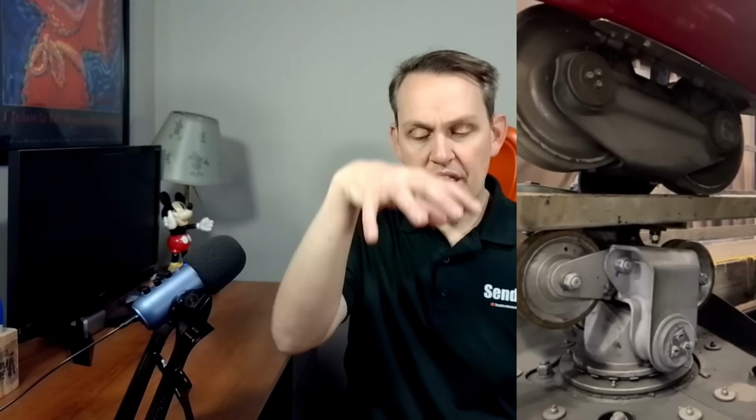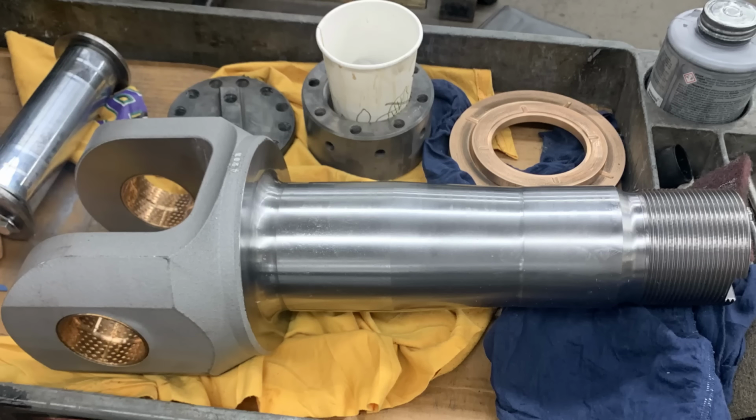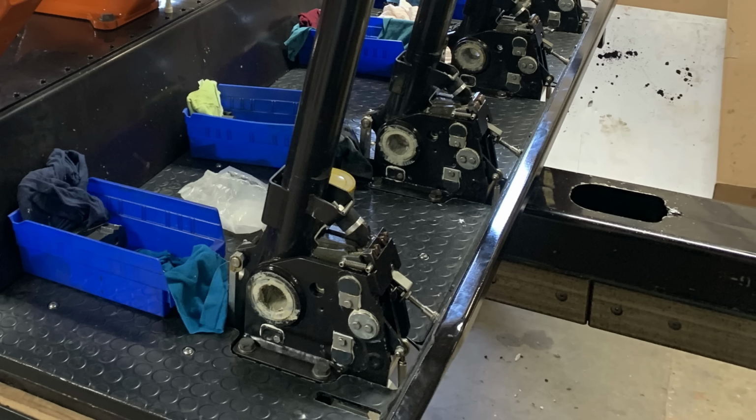For inverts and stuff like that, they have a giant pin that sits through the top of the thing. Instead of a Roth bearing, it's got smaller bearings in it. Those don't require so much NDT as they just require replacing during the off season, so that's not a really big deal. But that big pin that goes through the whole assembly, Intamin would call those a king bolt that sits in there. It looks like a big T that sits inside the thing. Those pins have to go out for NDT. You're talking hitch forks, 2-axis blocks, couplings, cardan blocks, anything in the restraint assembly.